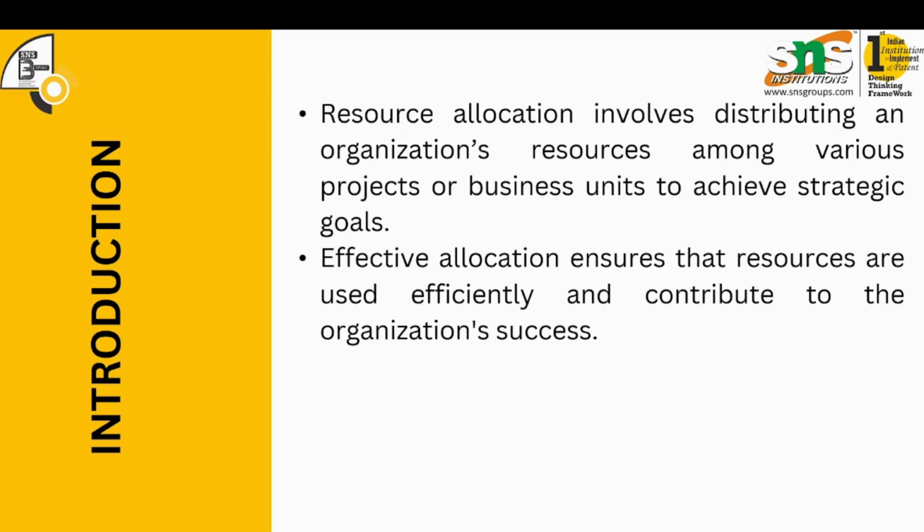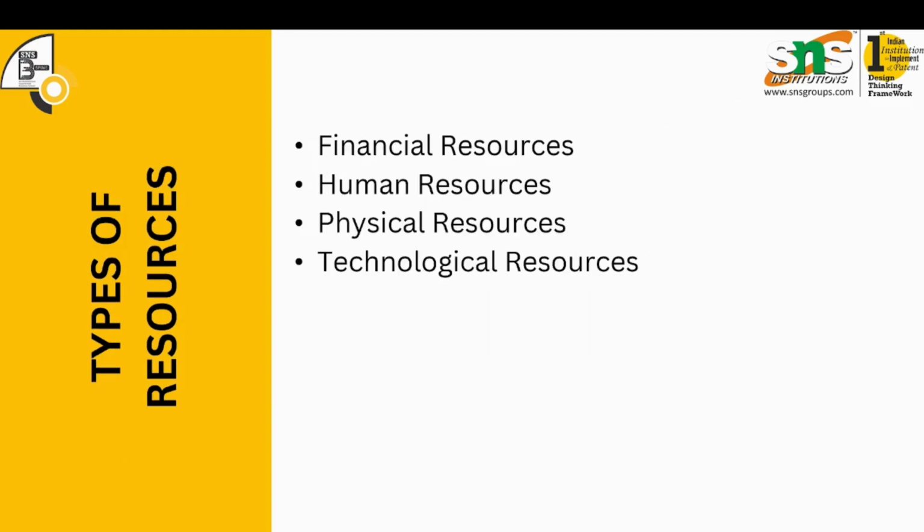It doesn't mean we have to give fewer resources. This can be vice versa also. For a work that demands 8 people, we only allocate 4 people. Would that even work out? This will put a lot of stress on the 4 people that are working, and they'll definitely not be able to perform because they are doing twice the amount of work that they're supposed to do. So, in either case, it's important that there's effective allocation of resources.